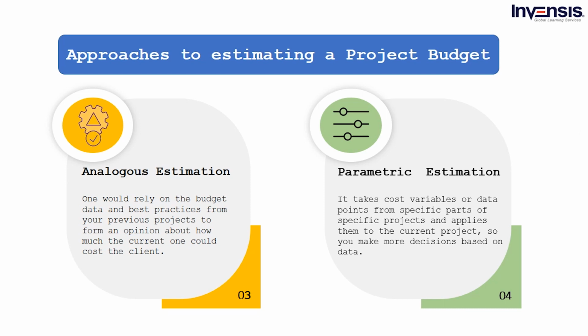This technique is more accurate than similar estimation because it involves more than one data set and exploits the statistical link between historical data and variables. The negative is that it's typically difficult to identify useful data points for digital initiatives.